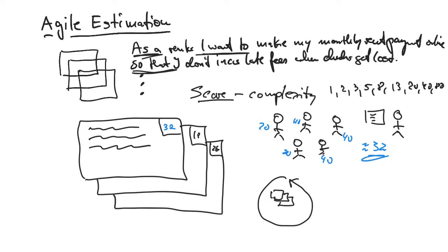The ones you really got done, that means they're tested, they're ready to be deployed, they're fully implemented. If they're not fully implemented, you put them back on the backlog at the end. You only count stories that have been fully implemented. Then, at the end, you take the completed stories and add up their story points. So that basically gives you a number of points.